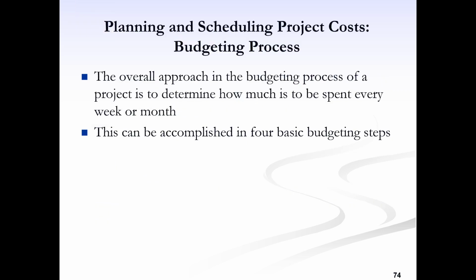The first thing is making the budget for each activity, because when we want to control and see whether we are on time or behind schedule, or we want to see whether the cost spent is within the budget limit or we are overspending, we should know what is the cost of each activity. So the first thing is that the project manager will estimate the cost of each activity, and from there, adding all the activities, we can know the total budget of the project.